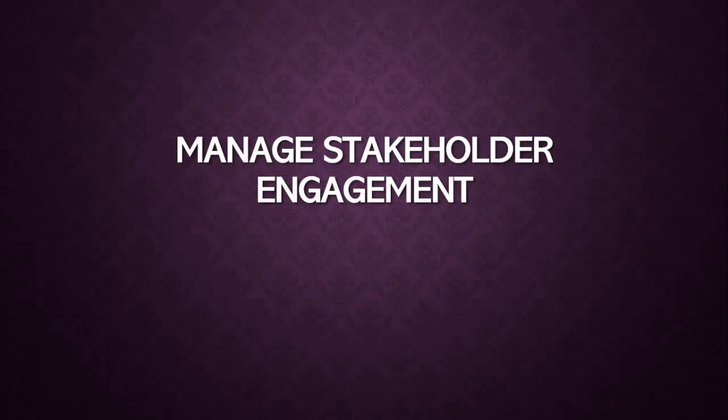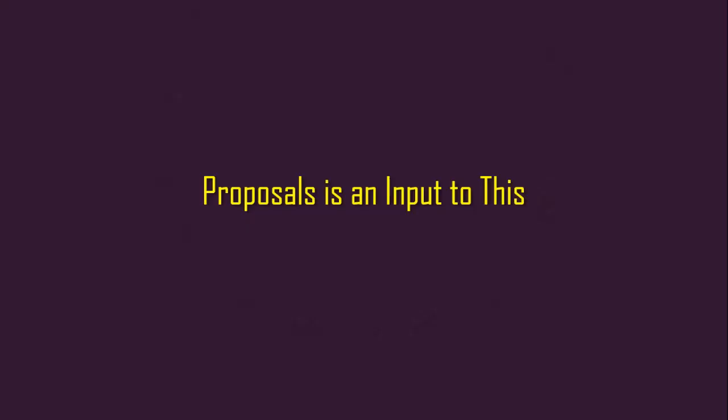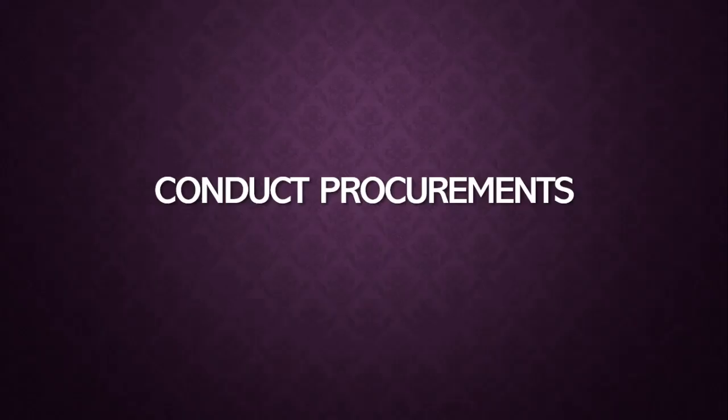Here's your next one for today. Proposals is an input to this process. All right, 3, 2, and 1. Proposals is an input to the process known as conduct procurement.